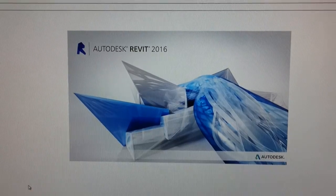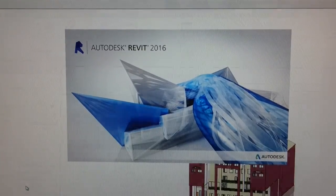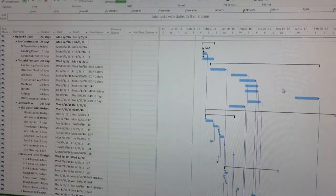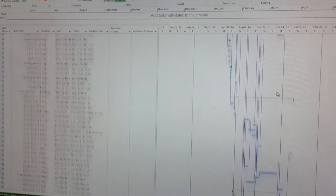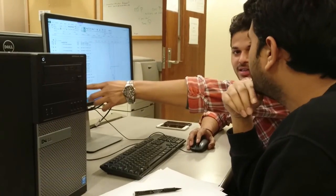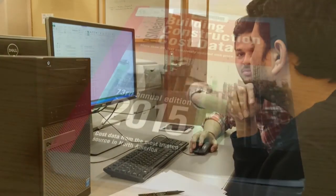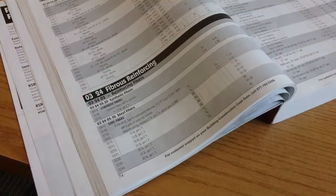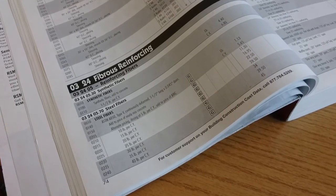We have a Revit model from which quantities can be measured. Then, considering the activity, crew size, equipment, workspace, etc., we deduce the best possible productivities based on our work experience in construction and also the recommended standard RS Means for Building Construction 2015.